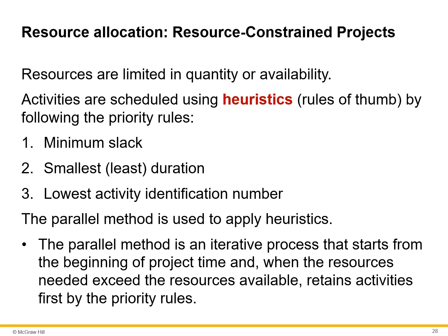Heuristics do not always yield an optimal schedule, but they are very capable of yielding a good schedule for very complex networks with many types of resources. The efficiency of different rules and combinations of rules has been well documented. However, because each project is unique, it is wise to test several sets of heuristics on a network to determine the priority allocation rules that minimize project delay.